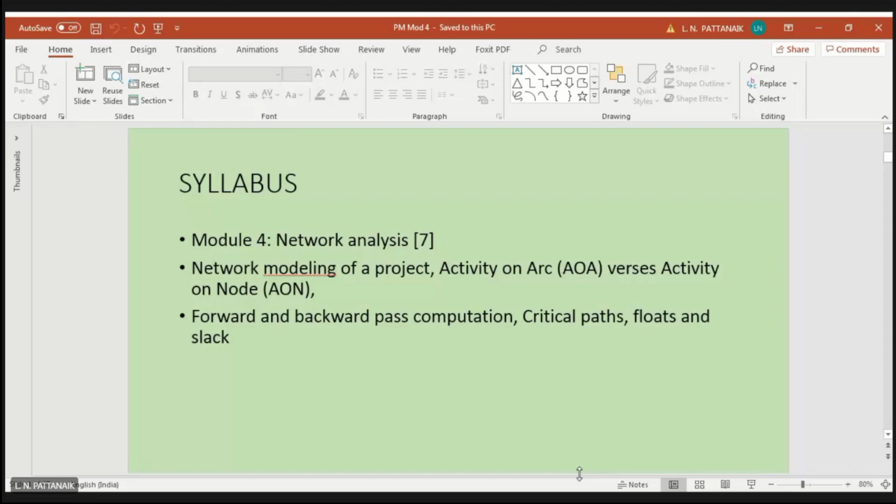giving the RCC structure, right? The roof. Then maybe the plastering, though not in that order I'm talking, but these are the activities. Maybe the fittings, the electrical and the water fittings, then maybe the plastering of the walls, then fitting the windows and doors, then plastering and whitewashing and things like that. So these are all the activities which typically a house needs to complete it, right?